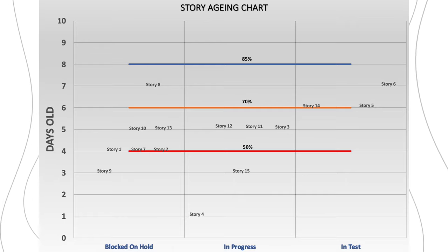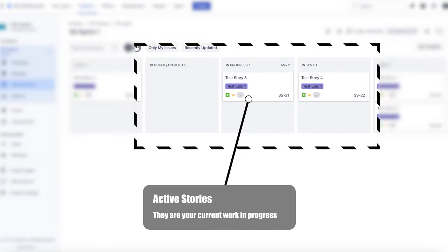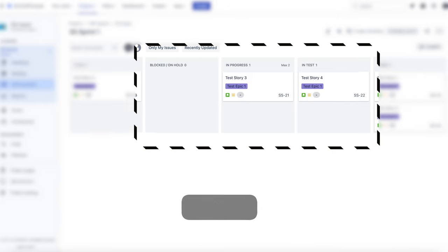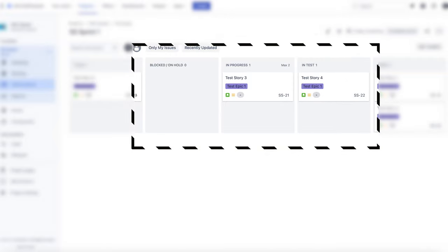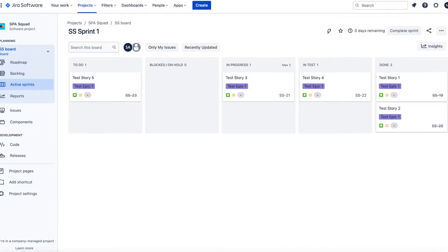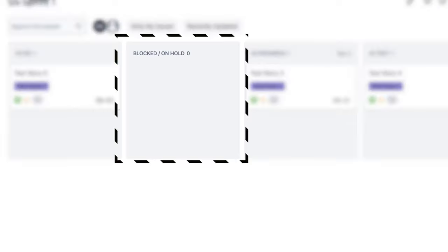You're going to display how old each story is and where it is in your workflow. How old an active story is starts from the moment you begin it, up to but excluding when it enters done. In my workflow, a story is only considered active when it leaves the to-do column and enters in progress — the timer starts then and only ends when the story goes into done. So only blocked/on hold, in progress, and in test count as active time. Don't forget to use your blocked/on hold column: move an active story into this column whenever you're not working on it for any reason. This is extremely important, and it's the subject of my next video.